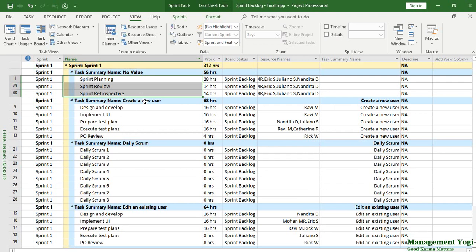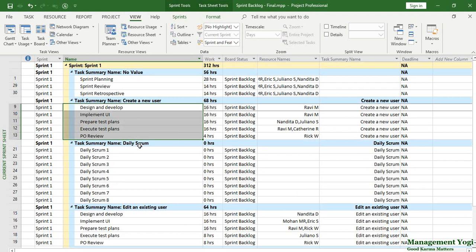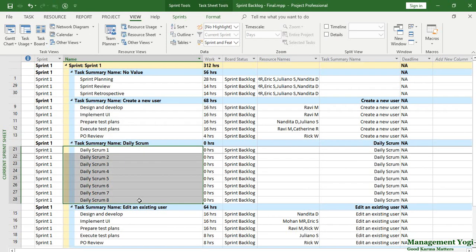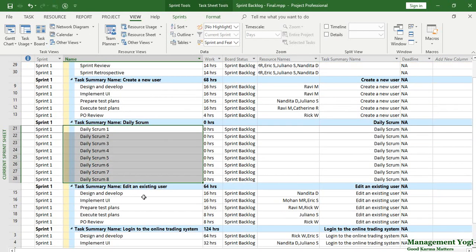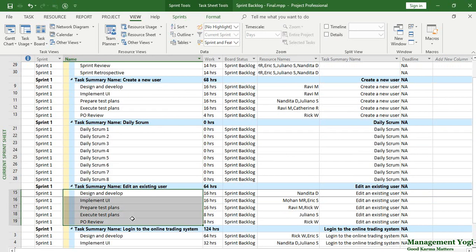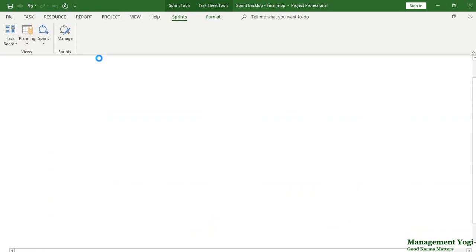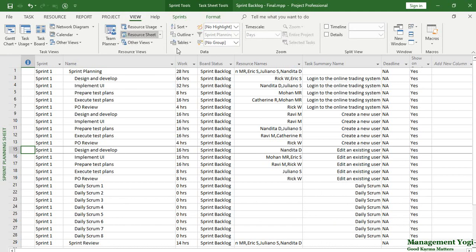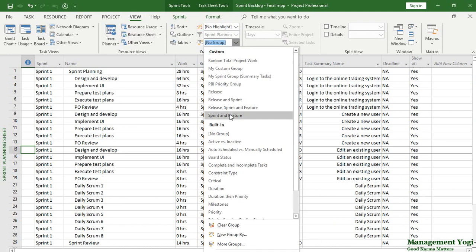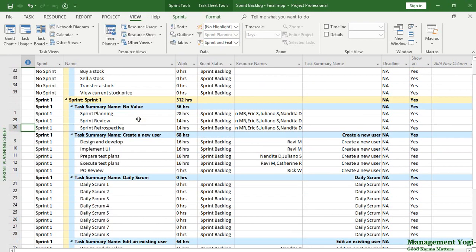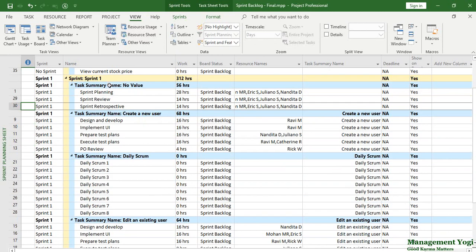Then you have 'Create a New User' as a feature with five subtasks. Daily Scrum is a recurring task — we have eight daily scrums for the two-week sprint. Then 'Edit an Existing User' is another feature, also with subtasks. Similarly, we can apply the same custom grouping in the Sprint Planning Sheet view — go to Sprints tab, Planning group, Sprint Planning Sheet view, then apply the same 'Sprint and Feature' custom group. With that, you have information across all sprints with task summary names and subtasks visible.